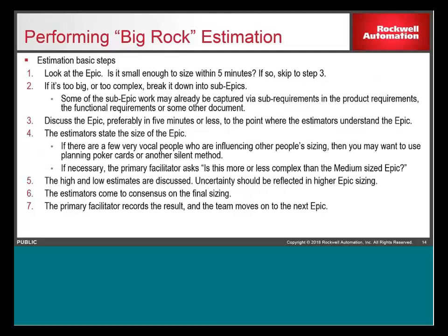So on this slide are the basic steps. Realistically, the first thing you want to do is look at it and say, is it small enough to size within 5 minutes? Do you have enough information? Do you have enough details? Do you understand the complexity and potential scope? If you do, then go ahead and do the sizing.